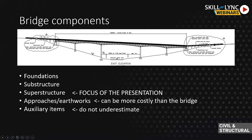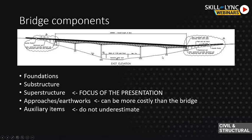For example, the approaches. In some cases the approach is quite small, but in a lot of cases the approaches and earthworks around the bridge can cost as much as the bridge itself. So you should not underestimate the amount of geotechnical and groundwork around the bridge. There are also auxiliary items like parapets, lighting, and access and maintenance — small items, often not as glamorous as bridge design itself, but they can contribute quite a lot of design fee and work. Never underestimate all the additional items in a bridge.